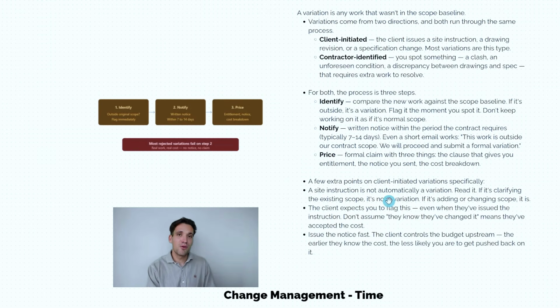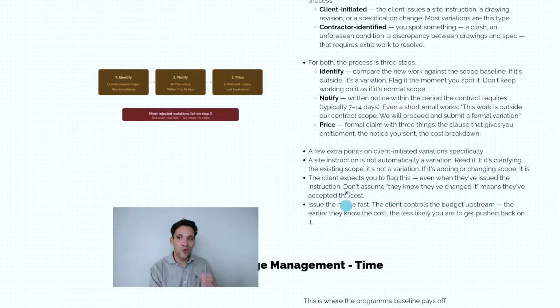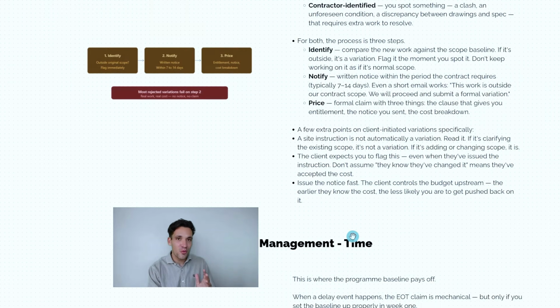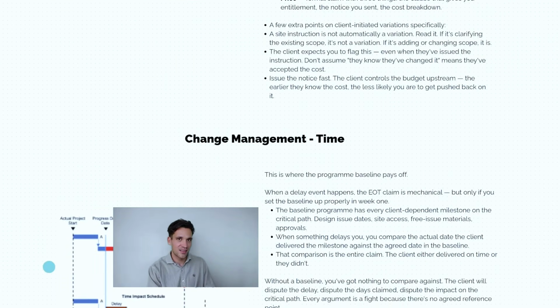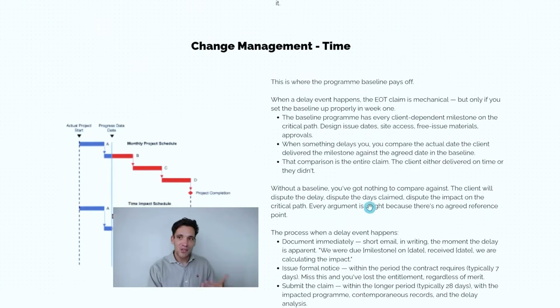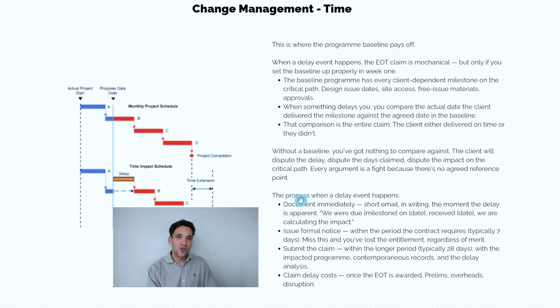Again, so important. Going back to tracking correspondence, it is so important that you track all your correspondence. It's going to make it so much easier to prove these variations exist. Now, when we were setting up the time baseline for the project, that is why it is so important to have a clear baseline of when everything is going to occur, a critical path that shows the series of activities that, if delayed, can delay project completion. If you cannot show the earthworks are on the critical path, you cannot claim extra time for the unidentified service because you're not actually changing the duration of the project.